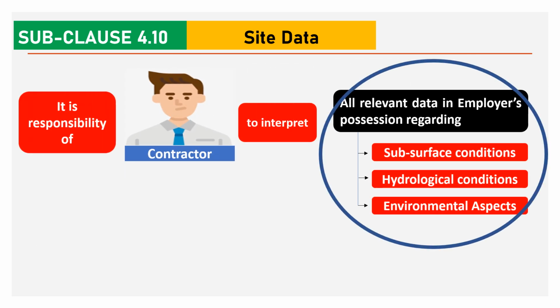However, it is the contractor's responsibility to interpret these data. So providing data is the employer's responsibility, and interpretation of the data is the contractor's responsibility.